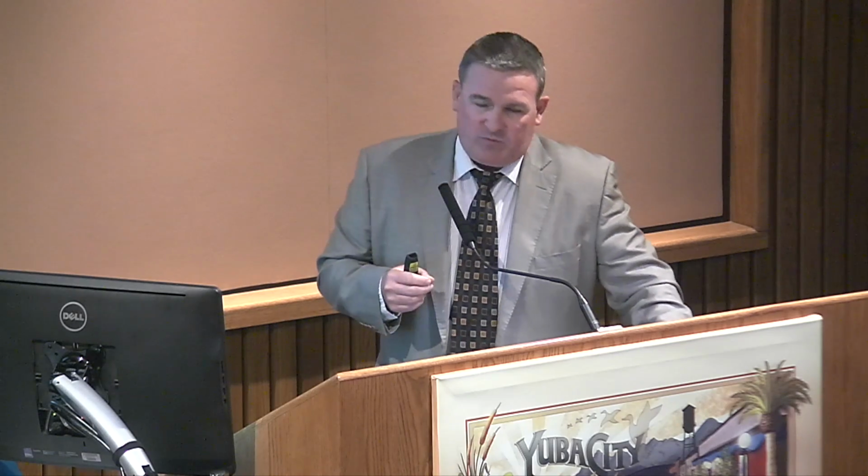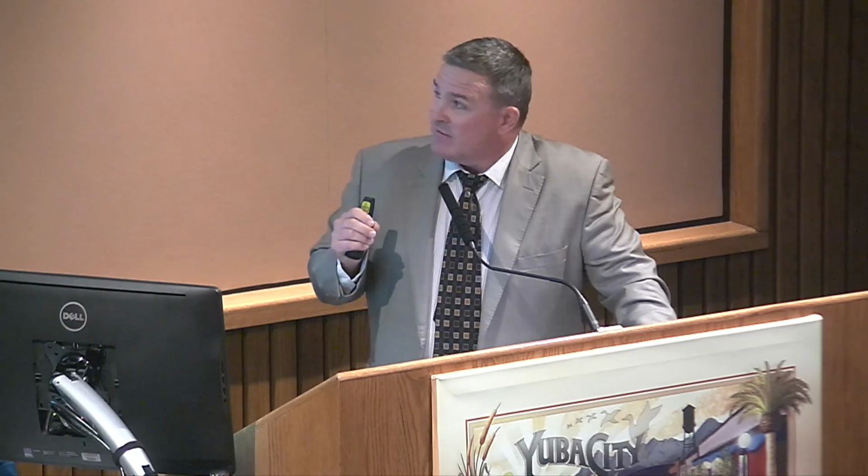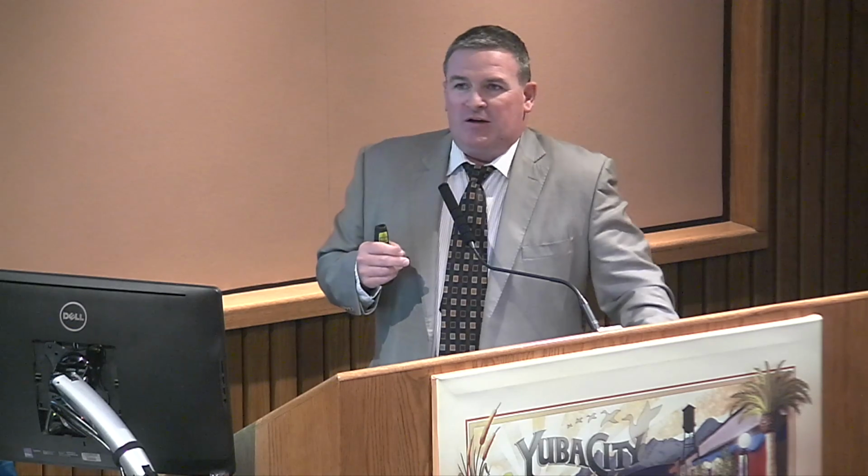So for Phase 2, staff is recommending that we use that cooperative purchasing agreement. The municipal code allows it, with sections in the procurement manual under sole sourcing regarding compatibility with existing equipment from one vendor, and quality requirements not available in comparable products. Also, when we looked at Sourcewell's contracts with Musco, there's specific language about complying with all state laws and paying prevailing wages. Staff recommends that we utilize that in order to avoid higher prices and issues with timing.